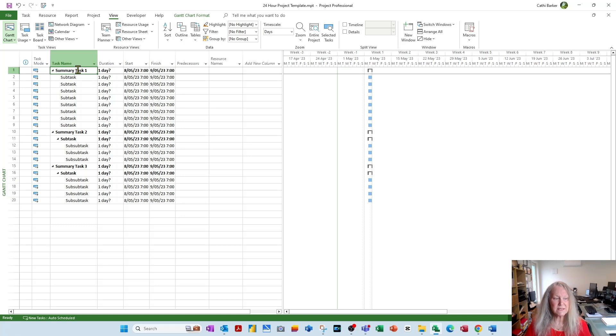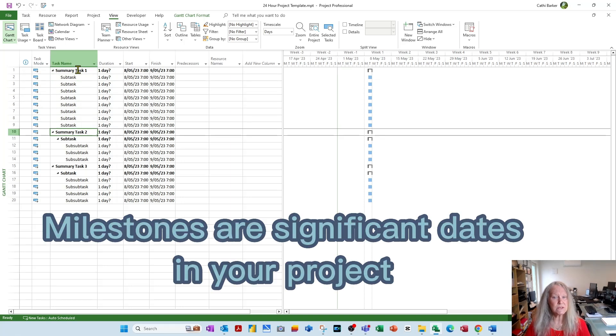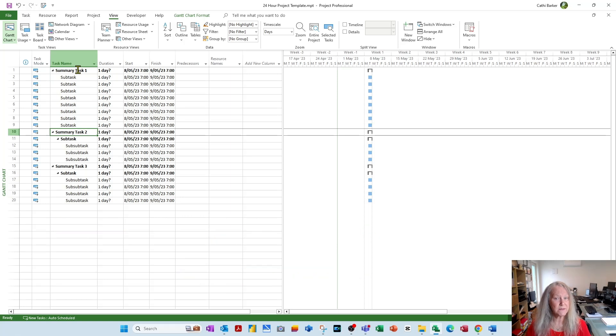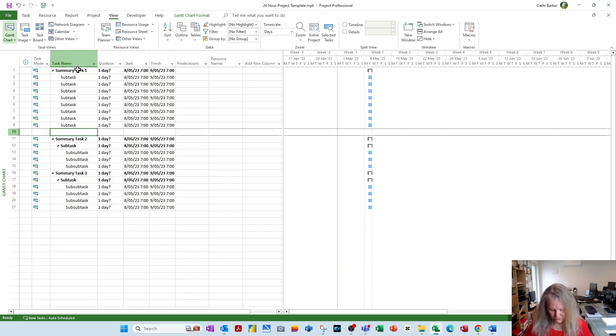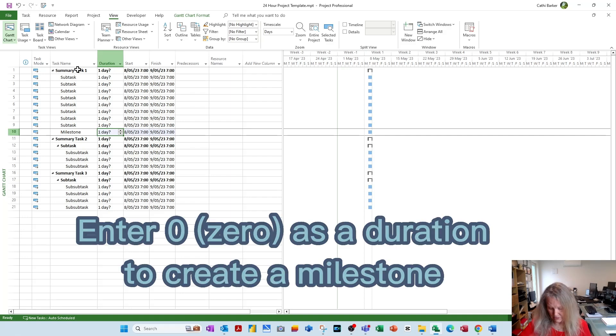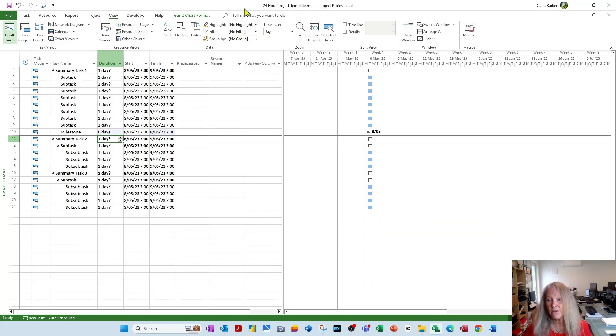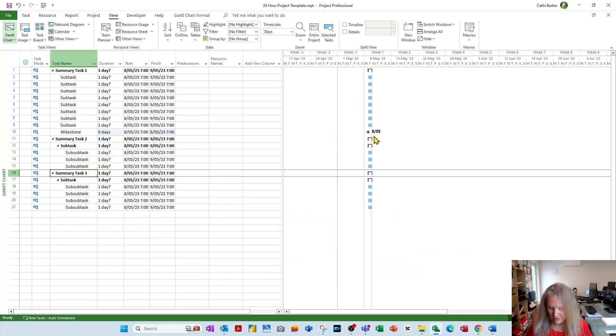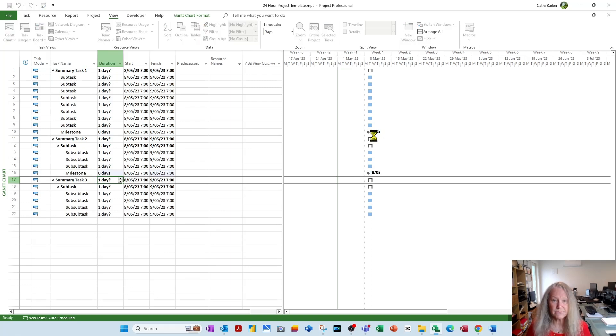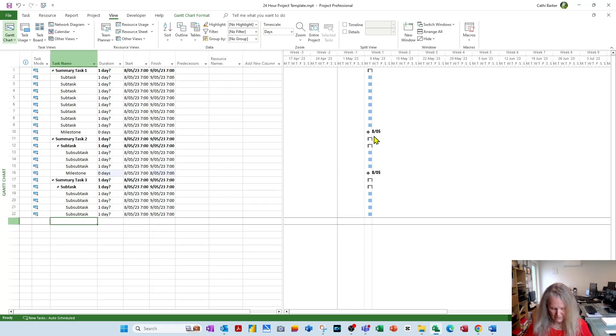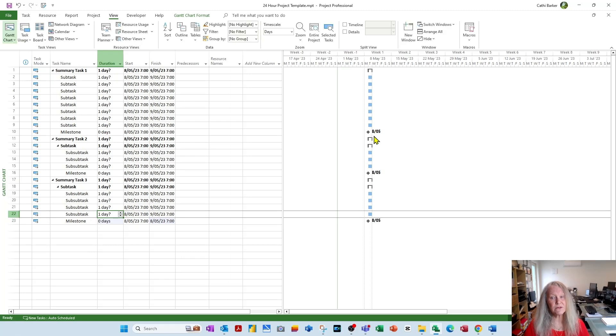Now, another thing that's missing, I think, from this template are milestones. We really should have significant dates inserted into our project. So I'm going to put a milestone at the foot of summary task 1, summary task 2, and summary task 3. I'm just going to press the insert key on my keyboard while I'm sitting in row 10, which inserts a row. And I'm going to call it milestone. Now, to create a milestone is to enter a duration of 0. So I'm going to type 0 and press enter. And a milestone appears as a diamond with a date on your Gantt chart. I'll go down here, insert milestone, duration 0. Down here, insert milestone, duration 0. And I've inserted 3 milestones, significant dates, into my template.